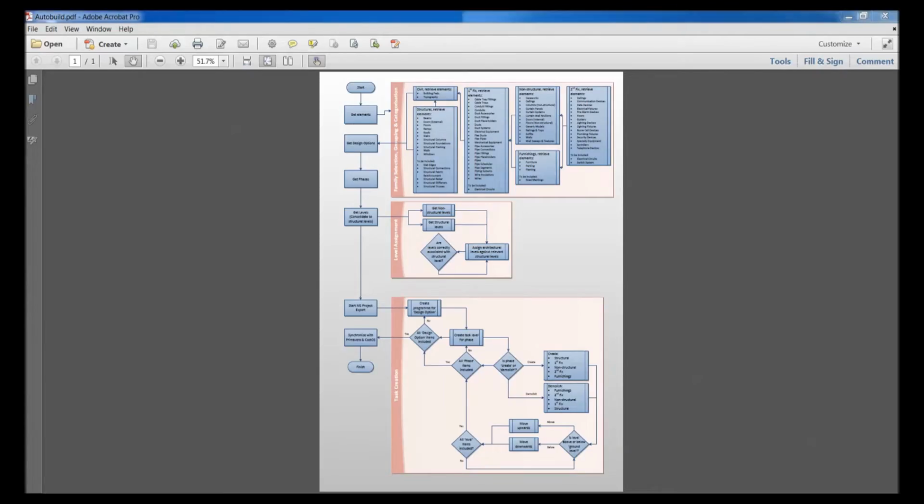This image is the workflow for the entire process, which is broken into 3 separate areas. Each area I will explain in more detail, but as an overview, the very first container is the element selection and attribution. These are divided into different areas which are meant to replicate the actual construction sequence processes. The central container is to do with level association and ground level assignment, and the final container refers to the actual logical sequences that produce the task hierarchical structure as well as the tasks themselves.